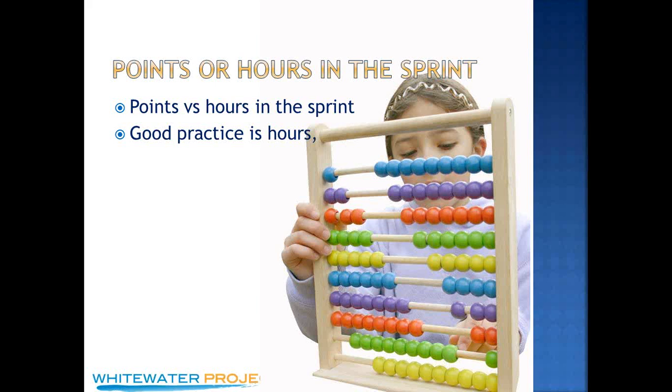And then you look at the stories in the backlog that are highest priority. You start grabbing those and breaking them down into tasks. What are all the tasks associated with this? And you give them a general hours estimate. And nobody's going to hold your feet to the fire on the hours estimate. But it's really only estimating the work that you're going to be doing in the next about 10 business days, or somewhere between 10 and 20. If you have a 4-week sprint, it's still 20 days. It's a lot more than 10, but it's not that many days.